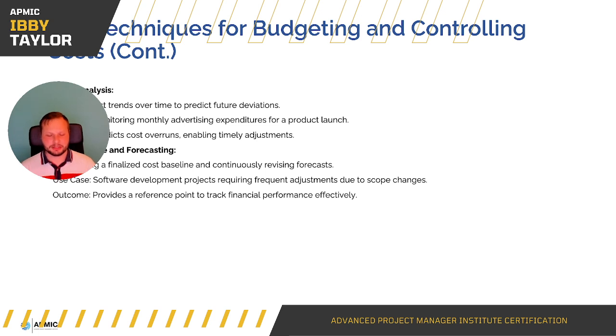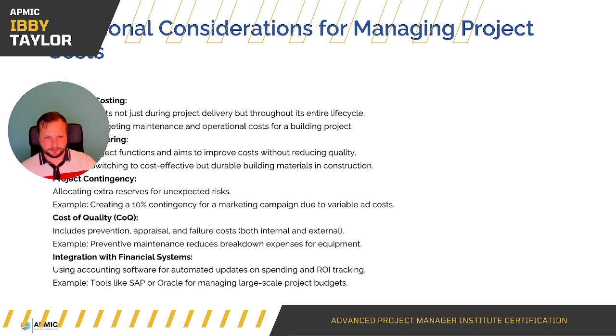You know, here you go, Mr. Customer, here's your alpha build. They then come back and say, right, actually I like this, but I don't like X, Y, and Z, can we change it? The financials, the baselines and the forecasts will then need to change as a result. And this provides a reference point to track financial performance effectively.